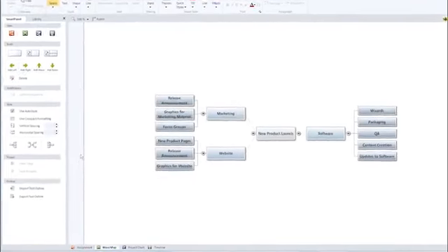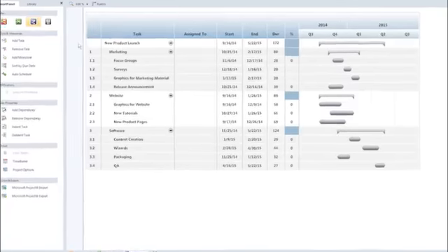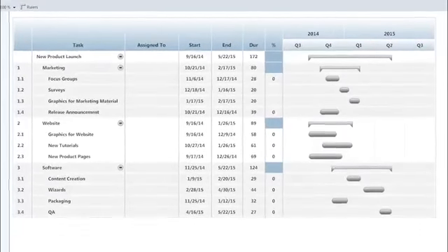When you're done organizing your project with a mind map, go back to the project chart view to see all of your tasks and subtasks neatly indexed into a hierarchy, making it easy to now figure out how long each task will take. Often one task or subtask cannot be started until another one is complete. In this case, you'll want to add a dependency.